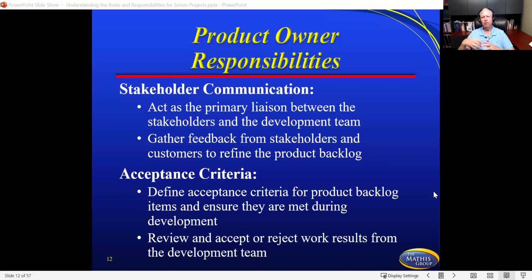And then, of course, the team is actually going to do a retrospective, which is very similar to lessons learned, to decide what they did good, what they did bad, and what they need to do next time. So they're learning after every sprint. So this acceptance criteria is there. If the customer comes back and says, wow, this isn't working at all like what we thought, that's going to be communicated to the team so that those items can either be fixed, worked back into the backlog, or at least the team understands what the requirements need to be from that point forward.